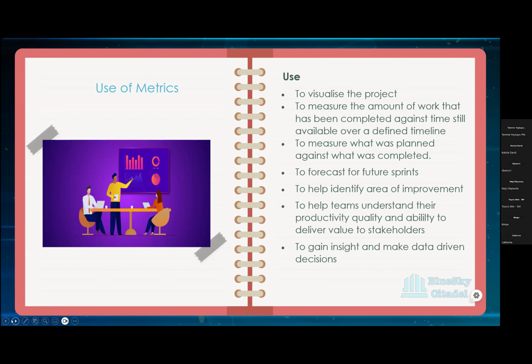We'll get to that also so that you know why it's not burning down and everything. A lot of people say, we're doing what we're doing, but it's not burning down. If you do not update the status of your story, it doesn't get burned down. So you'll have your work items burning down when they get to the closed column.